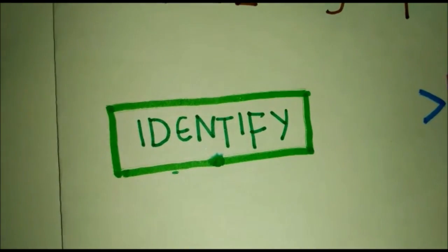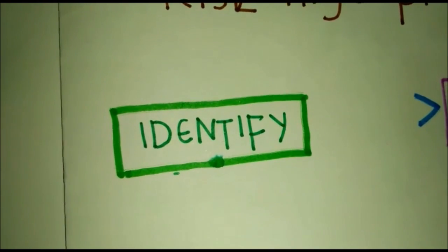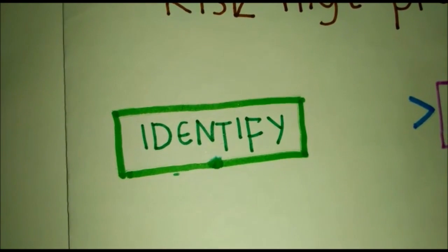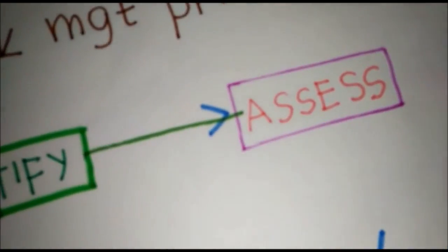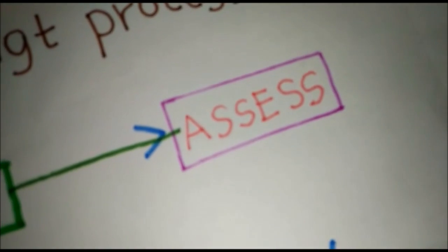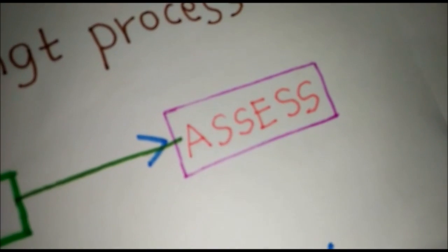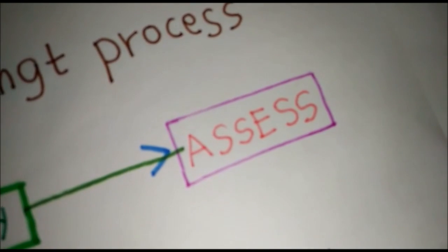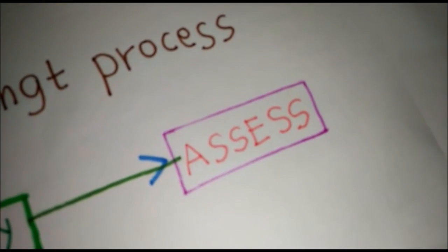Risk can be abuse, either one-time or ongoing, personal injury, medical, environmental, property, financial, and reputation. Next step is to assess the risk. If you have done a thorough job of identifying risks, you may end up with a long list. The next step is to assess each of the risks based on the likelihood or frequency of the risk occurring, and second, the severity of the consequences.